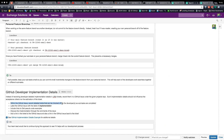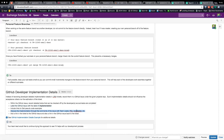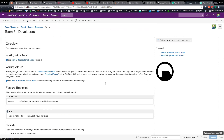Within the GitHub issue: record detailed to-dos that can be checked off by the developers as subtasks are completed. Label the GitHub issue with 'implementation.' Include links to pseudocode examples. Discuss implementation through the comments of the issue with PEs, team lead, architects, et cetera. Add a link in the JIRA ticket to the GitHub issue. Your team lead would like to continue trying this approach to see if it helps.